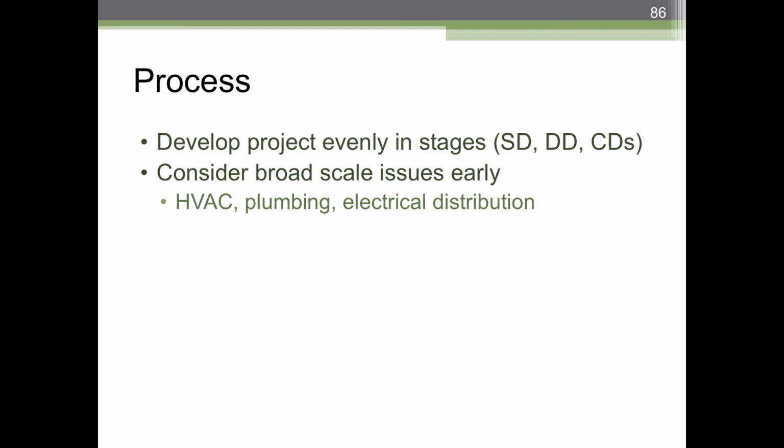Anyway, in design development, you're going to work out all of that, try and decide on all of the assemblies, make sure that your firewalls are constructed as fire-rated construction, and all that might imply, and do a full code analysis. Typically at SD and at DD, you'll be doing a cost estimate, but DD is really where you get a good sense of where you're headed.